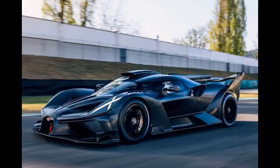Chassis, $60,000. This is a lightweight, custom-built chassis. Aerodynamics package, $45,000. This is a cutting-edge aerodynamic package designed to increase downforce. Labor, $40,000. Spread over 5 months at $8,000 per month. Materials, $35,000. Spread over 5 months at $7,000 per month.